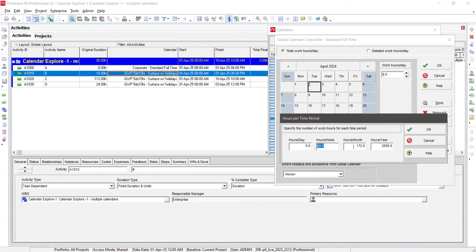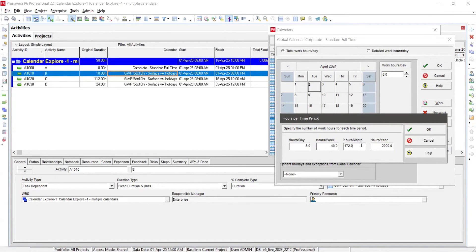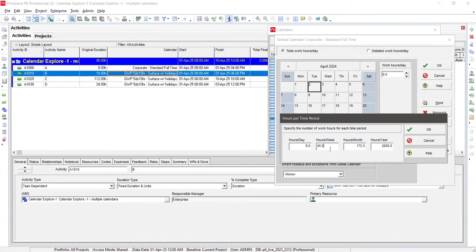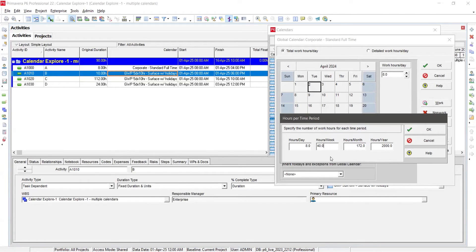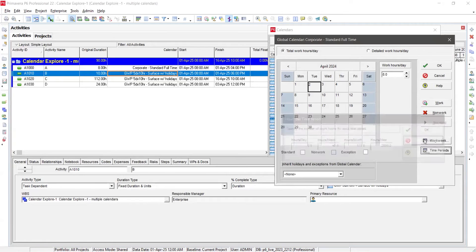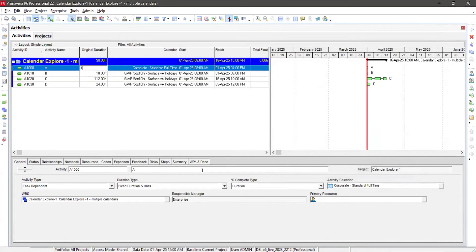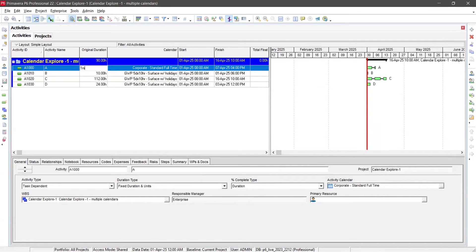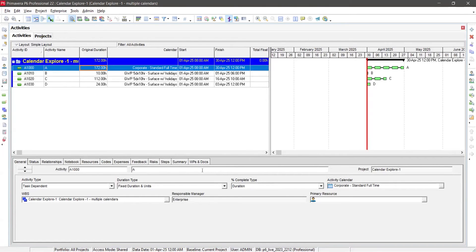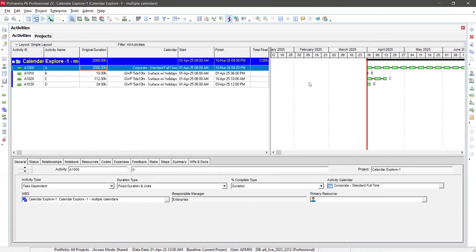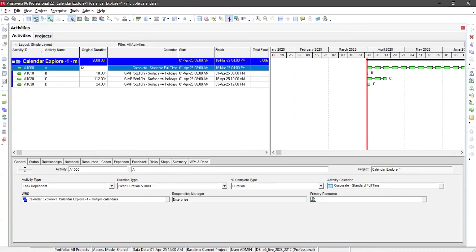What about these other guys? Weeks, months, years. Well, I don't care about them. You can set them to whatever you want. These are rough. And the reason I say I don't care about them is because we normally just work in days or hours. That's it in P6. I don't really look at weeks. Now there are conversions in the same way you type in one D. I'm going to show you this, but you can also type in one W, one week. What's in 40. You can type in one M per month. It uses the same values from that conversion to convert to 172 hours. You type in one Y, 2000. But I never look at data in terms of years or months or anything. I usually look at it in terms of days and whatnot. So I don't really focus on those. I care only about the days. So that's where those conversions happen.